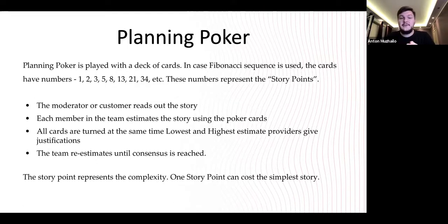So once you have defined 1 story point correctly in your team, like the one easiest task is 1 story point, it's much easier to estimate because you usually compare the task with this one. Even if you feel it's hard to compare the simplest task with your one, you can always pick another task which is already estimated, right? And compare with it, also simple. So in this case, you can put the right numbers in the right places, and you can negotiate.